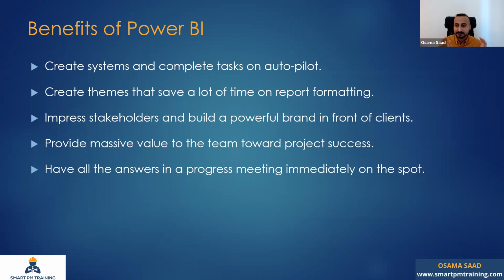With Power BI, you can sit in the meeting. You only need your laptop. You can go to the activity DNA, as I showed you. And in seconds, you can tell the contractor, no, it is not correct. You achieved 0% over the past week, according to your schedule update. And instead of ignoring the issue and closing the issue, you request that everyone spends more time talking about the issue and addressing the solutions. And that's how planning engineers can add value to their projects.